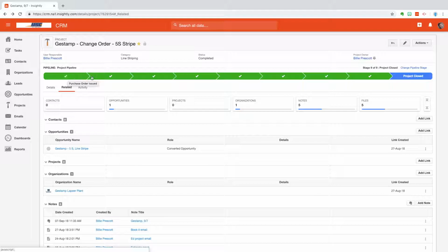So then we've got our workflow for a project. Purchase order is issued. We get the project scheduled. The work order is complete. The work is delivered. We kick off the job. The work is finished. The project is invoiced. It's costed. And then we close the project. We'll delve into some of the deeper functions on how we move into the different portions of the workflow